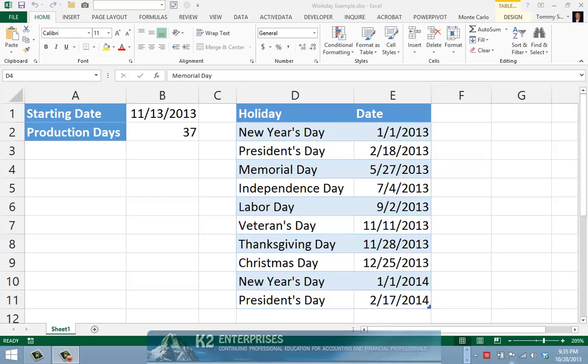Consider the following scenario. Your company just received an order to custom manufacture a piece of machinery. Your team will begin the manufacturing process on November 13, and you estimate the manufacturing process will consume 37 days. Further, your production facility does not operate on weekends or holidays. Given these variables, you need to calculate the estimated completion date of the project.